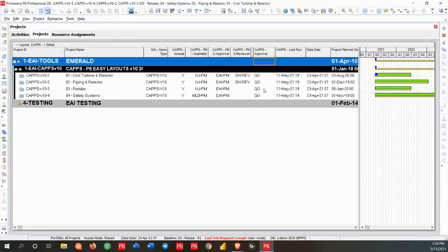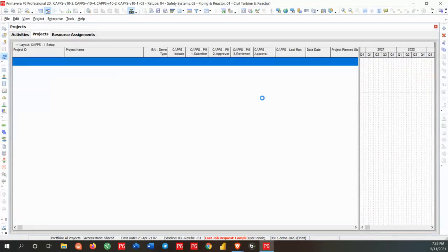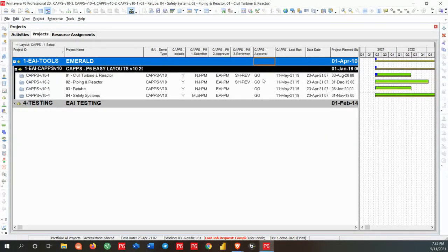But normally you would probably reschedule, which I probably should have done. I should have updated my data date, should have rescheduled, and then approved these in. And depending on how many updates you have, it'll take some amount of time. I have very few, so it shouldn't take too long. So what we do is we've got a combo of our P6 calculator software in the back end that does these pushes between the fields, and it should run through and say pass in a second here.